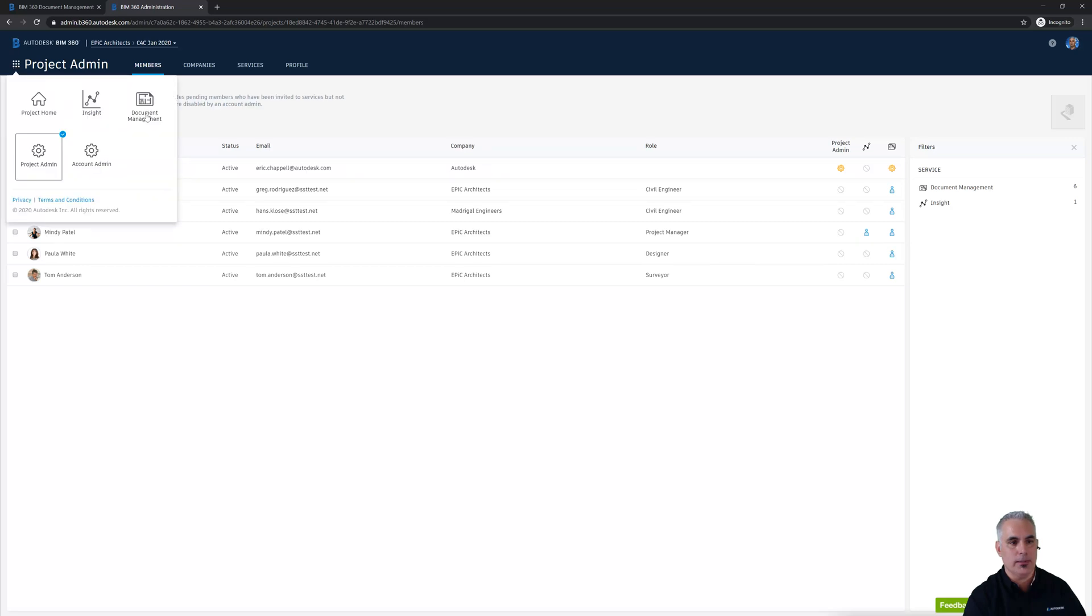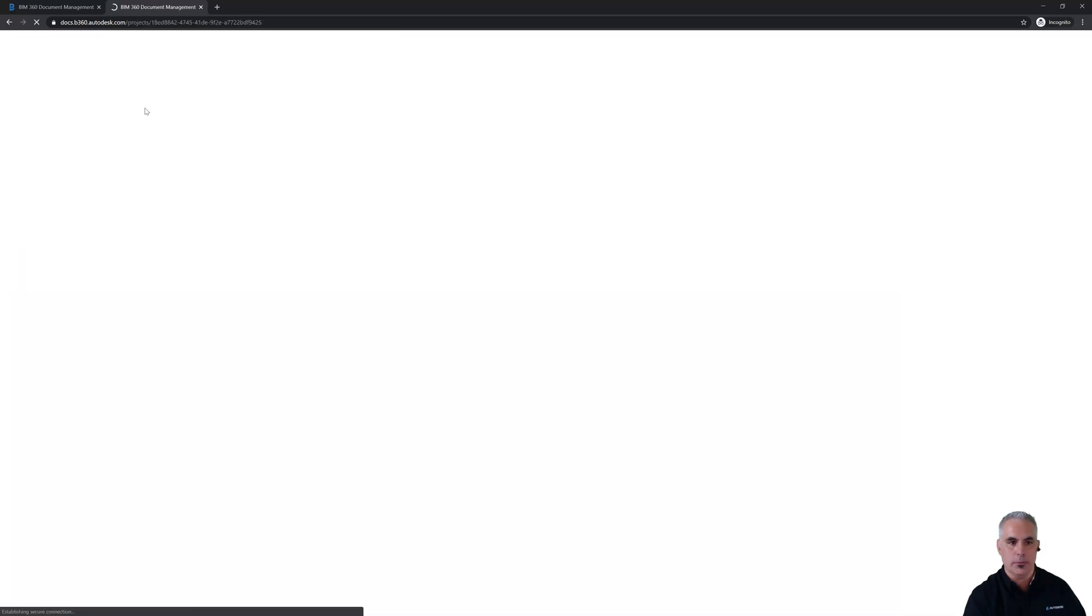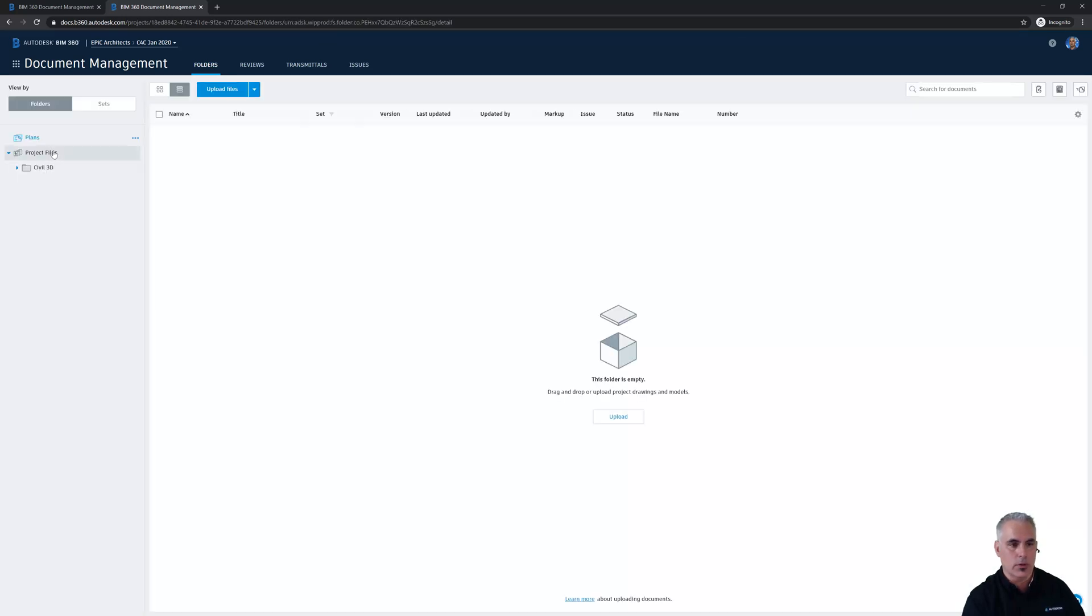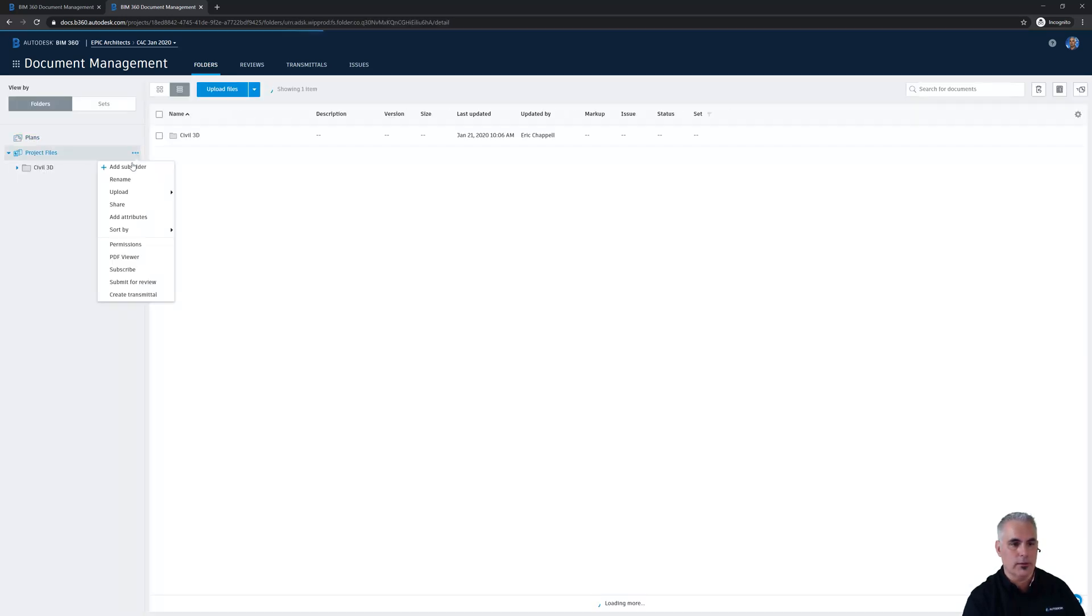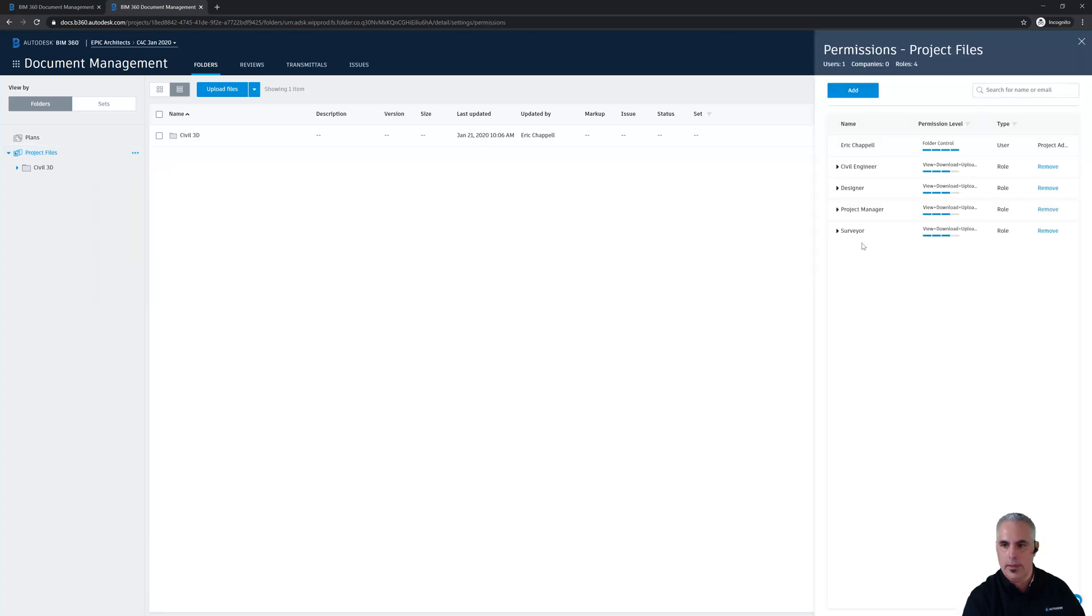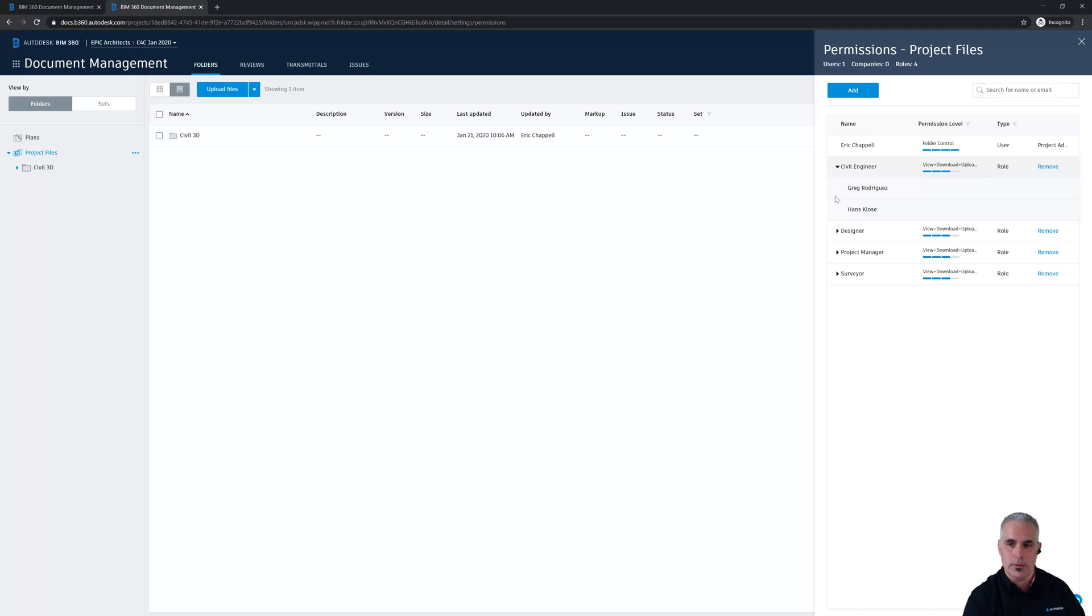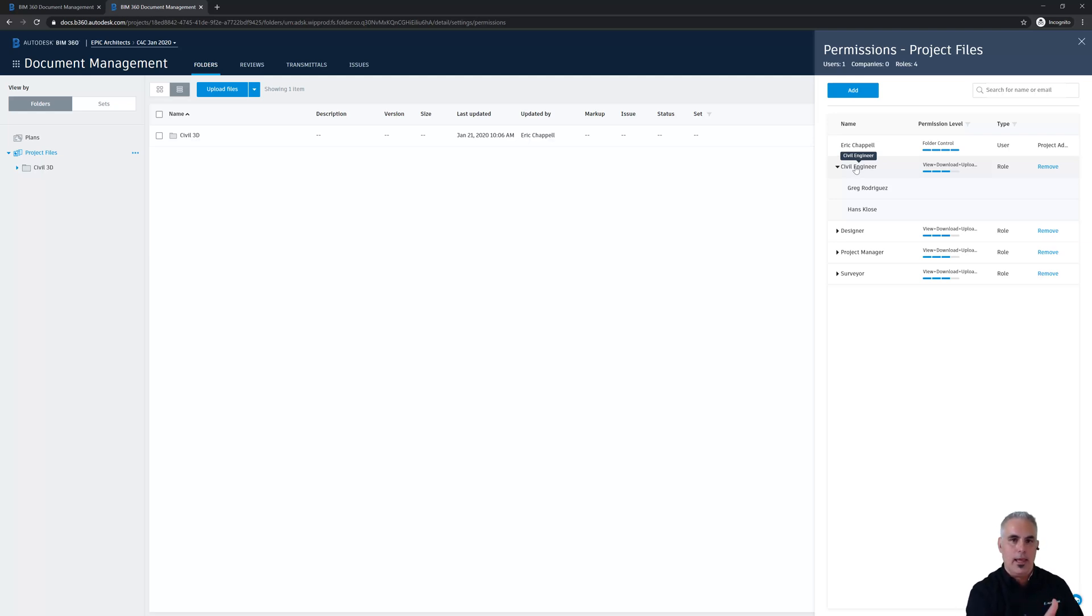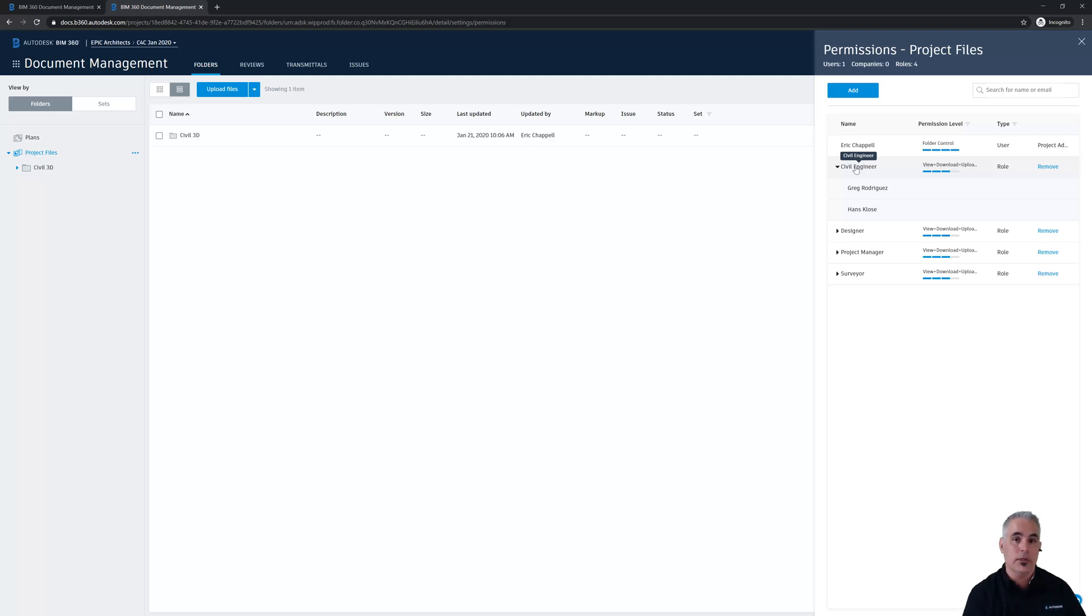So let's switch back to document management, and I just want to make sure that Hans actually did get permission to the project folder. So I'll go over here to project files, click the ellipsis, and then permissions. And if I expand out civil engineer, I should see two names listed here. Hans was added automatically because I assigned him the role of civil engineer. That's why roles are powerful. I didn't have to come back here and add Hans as an individual to this folder or any other folders where he may have needed specific privileges.